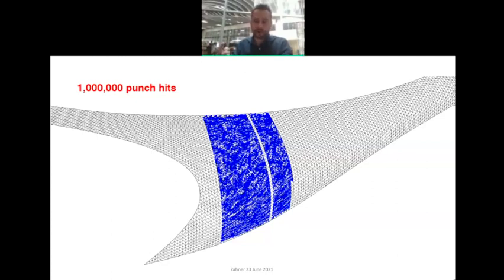Another big challenge was the surface finish itself, which on this project was a white anodized finish. Anodized aluminum is pretty well understood. It's a product available anywhere, but the white anodized, which gives it a whitish, a little bit more iridescent hue, is actually much more difficult to achieve. We don't anodize ourselves, but we have an anodizer that we work very closely with. So we had to go through a process of developing with them exactly what that process would be, and what the quality control would be, to ensure that at the end of the day, we achieved the surface that the architect wanted.